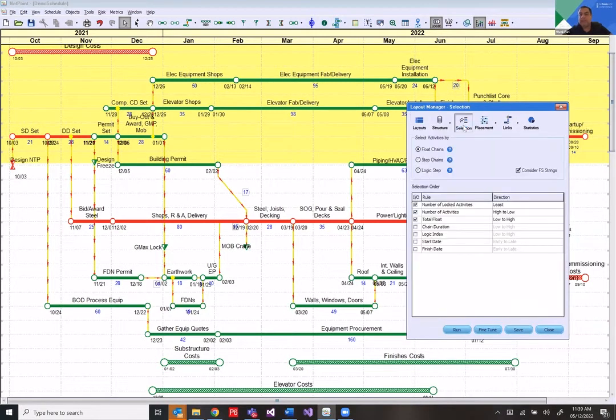To see why, one of the criteria is how you want to prioritize objects being placed. Right now, with all the layouts that I did, I chose float chains, which means that total float should flow and equal total float paths should be closer to each other. That's why you see the critical path being placed all as one, and that was my intent with the float chains.